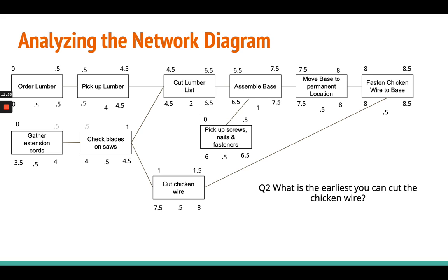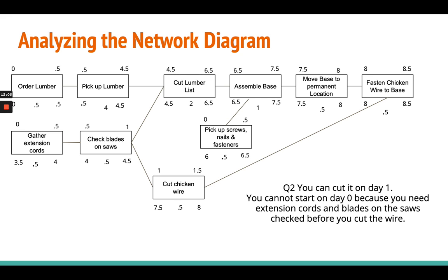What is the earliest you can cut the chicken wire? So looking at this network diagram, I invite you to pause this video. Oh, and this is answer 2, sorry. You can cut it on day 1. You cannot start on day 0, however, because you need extension cords and blades on the saws before you can cut the wire. So we start at day 0, so this will be actually day 2, but we call it day 1.